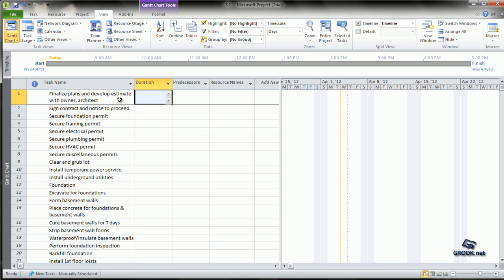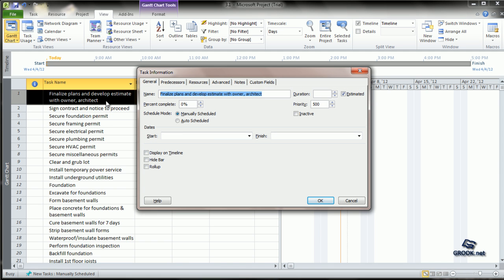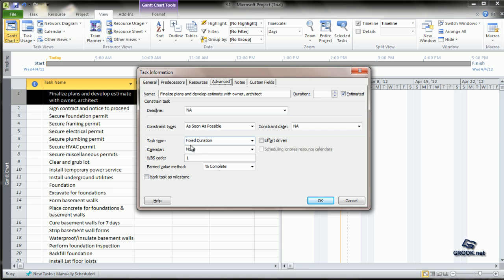There is one more type of entry for durations. If you double-click the task information, instead of manually scheduling — that is you calculating all the details — you can put it on auto schedule, in which MS Project calculates the duration, the units, and the work. You can fix any one of these. If you go to the advanced tab, at task type it gives you an option of fixing any one of the following: duration, units, or work. MS Project gives this option of fixing any of the parameters in the formula.